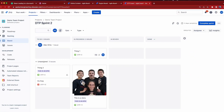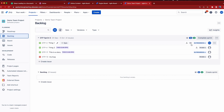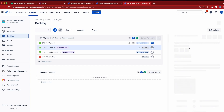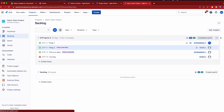Now let's take a look at a team managed project. Inside of a team managed project, when you're in the backlog view, you're actually able to inline edit story points. As you can see, I can hover — without even clicking — over a story and I'll see a bubble. I can click into it and find the story point estimate field, or even simpler, I can just hover and click the bubble and put my number in there.